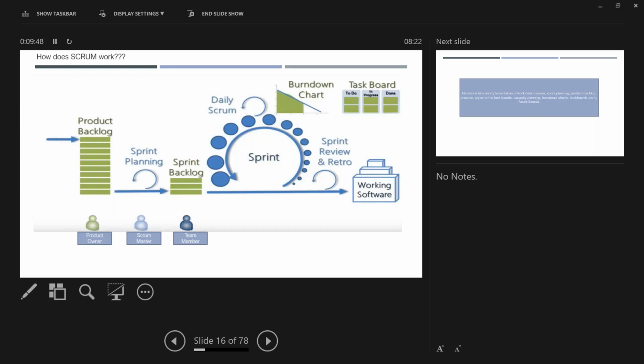So just an example. All these things will happen as part of your sprint planning. First, as part of sprint planning, you will estimate: I have 4 developers working for 8 hours per day for these two weeks. This is the capacity I have. Now, out of 1,000 requirements I have, I can take only 10 requirements because these 10 requirements will take 100 hours, and my 4 people will have that 100 hours of capacity. So that's how I estimate.